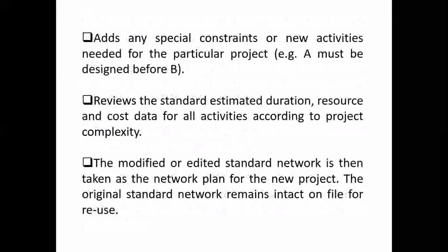So, reviews. Okay, the standard estimate of duration, resource, and cost data for all activities according to the complexity of the work that you have. So the modified or edited standard network is then taken as a network plan, as I mentioned, and used to plan the current project, which you also keep. And later on in future, since we're in this business, you might reuse the same plan.